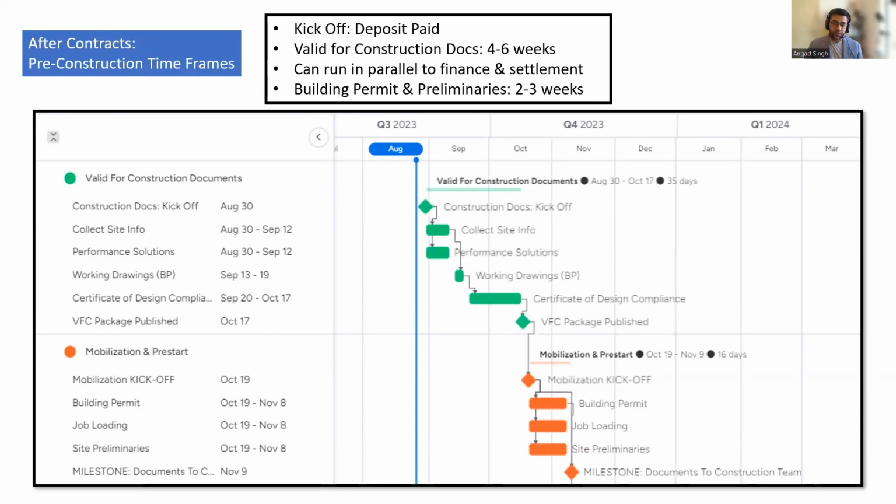Now, we're not in the heat of the labor shortage and the trade shortage as we were before. Builds are certainly starting to move a lot faster, certainly the single story stuff. But it's very important to understand that with a Class 3 build in particular, there is a significant lead time, because you need approval not only from the local council, but from the Department of Fire and Emergency Services. So that does take time, and that needs to be factored in.